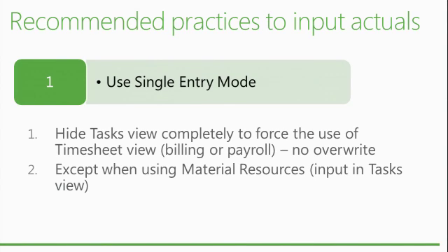So how do you prevent users, or most of the users, from entering that? You will use a security model to prevent people from accessing the task view and allow only a selected number of users to input the material resources in the system. All right? But otherwise, it's a good recommended practice to hide that task view.